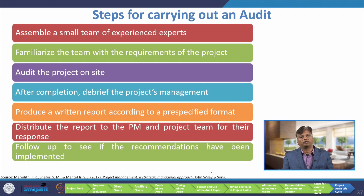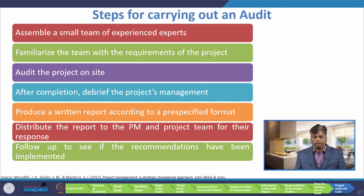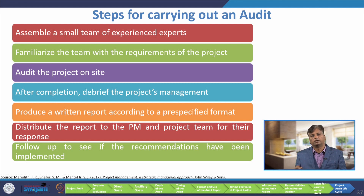Now we will discuss about the steps for carrying out an audit process. If it is a small project: assemble a small team of experienced experts, familiarize the team with the requirements of the project, audit the project on site. After completion, debrief the project's management, produce a written report according to the pre-specified format, distribute the report to the project manager and project team for their response, and follow up to see if the recommendations have been implemented. These are the steps for executing an audit.